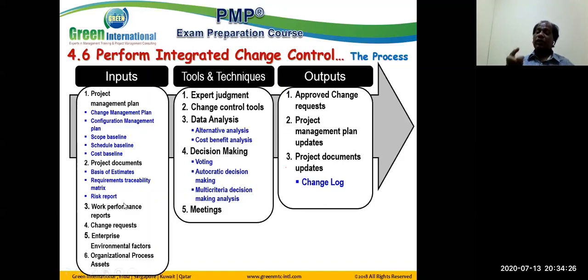As I told you, in the 5th edition, we documented other information in the risk register. In the 6th edition, they changed it. They created one more output, the risk report, where they document the implementation and monitoring of risks, all updated into the risk report so that we can understand the overall risk impact created on the project.